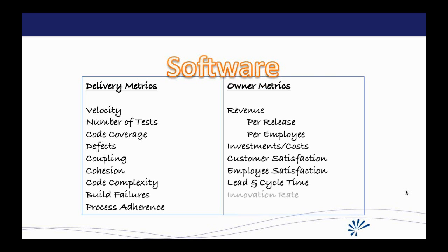What about revenue? How much revenue is your actual product generating? Do we know that? Is it important? It may not be important for some products, but this is something we should be looking at. For every release, how much revenue increase did we have? I've worked on some products where my business was able to tell me expected revenue for every single product backlog item on there. That's a rare thing to be able to do, but it's extremely important when you can make that visible. And it really helps in organizing your product backlog.